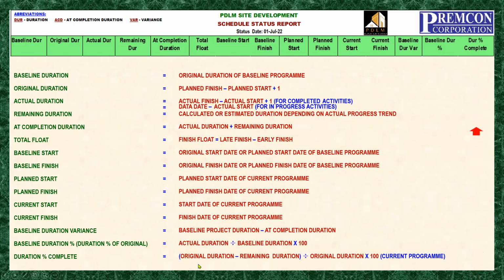Take note, this original duration, you might be confused, because this original duration is the original duration of the current program, not of the baseline, okay?